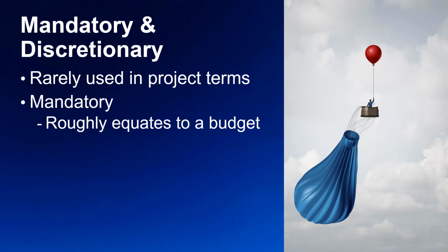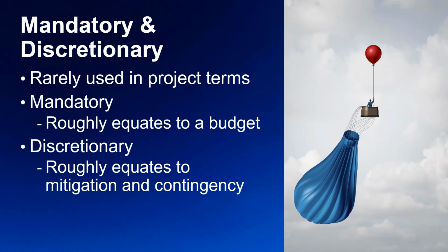The only place a cost can be considered discretionary is when we are addressing unknowns, reserves. The project manager has some discretion on how to mitigate risk and how to deal with contingency. If we feel that team morale is hurting, then we can use the reserve attached to a risk on morale to take the team to lunch or something like that.